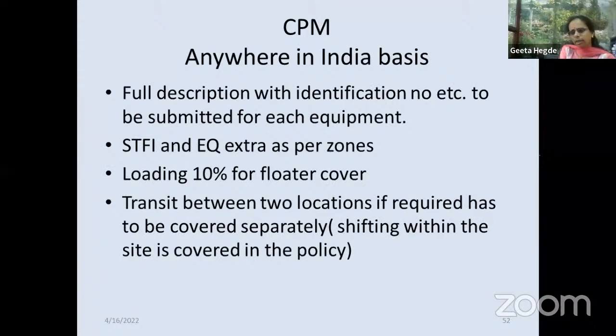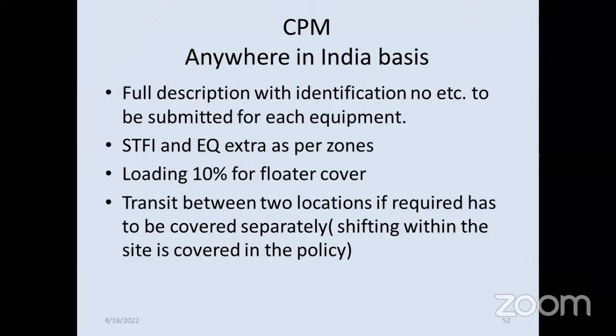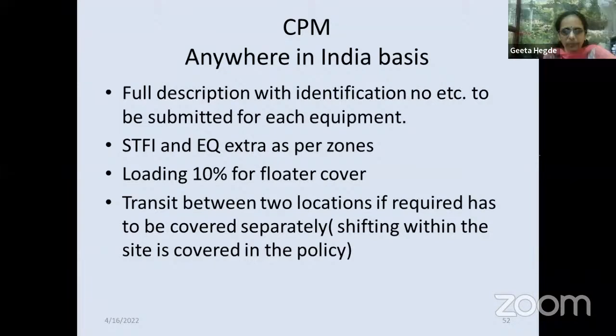CPM can be covered on all India basis. However, transit between different places will not be covered. It will have to be covered under the marine policy. Full description has to be given, and different locations have to be given, but shifting between 2 locations is not covered, while shifting within the site is covered under the policy. In one site, CPM machinery may be required within a little different distance, but the site is the same, that is covered.